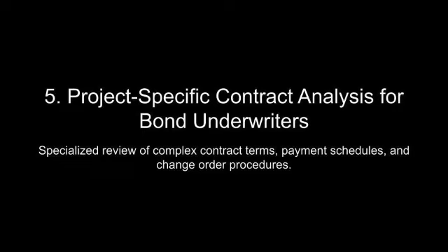Arbitration clauses, often favored in construction contracts for their perceived efficiency and confidentiality, require parties to submit disputes to a neutral arbitrator whose decision is binding. While arbitration typically avoids the lengthy timelines associated with court litigation, it can pose unique challenges for sureties. For example, arbitration proceedings are less predictable than litigation due to limited discovery and appeal options, potentially exposing sureties to unexpected outcomes. Moreover, many contracts require the surety to honor arbitration awards as part of their bond obligations, even if the surety was not a party to the arbitration agreement.